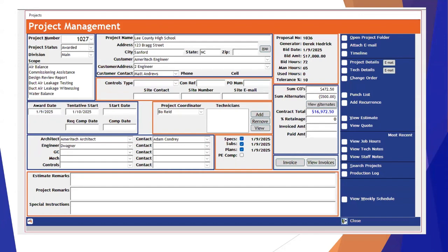Once again, within project management, we should be tracking all of our change orders. In our experience dealing with customers, the number one loss of revenue is not keeping track of change orders. A lot of times the change orders are requested, and our technicians are on site. They say, well, yeah, we sent a change order to your main office, they're working that up, they're going to get approval, while you're here, if you would just go ahead and take care of the work. The problem becomes that our technicians actually perform the work and we report it. It's just that the office isn't able to keep up with all the change orders that actually happen with that project, or it gets neglected.